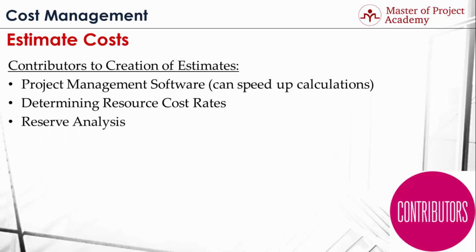Reserve analysis is another contributor to the estimation process. Reserves are planned to accommodate unanticipated costs and risks in a project. If there are risks for an activity in the project, depending on the probability and impact of the risk, reserves must be planned accordingly. For instance, if there is a risk of 2 days delay for a certain activity in the project, additional costs that will be caused by this delay must be planned as reserve and included in the cost estimation, respectively. And the last important contributor to the estimation process is